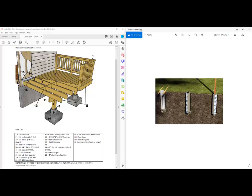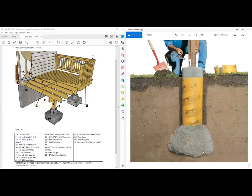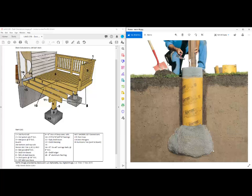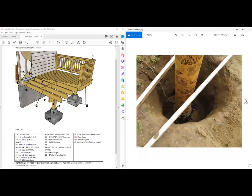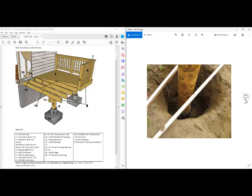Task number six is pouring of the footing. In this particular case, there's no real footing - they just put in gravel because there wasn't that much load and the soil could sustain it. They've just put the sonotube on top, leveled it, and made sure it's vertical by putting in temporary supports, pouring it, and then just putting in a saddle to support the post. This is showing the sequence. We can also provide some sort of bell footing, which is just a wider bottom or base. That's done when you're using the auger and you get near the bottom, you're rocking the auger in a rotational sort of formwork. That will dig out a bell-shaped base to give a larger area along the bottom of the sonotubes. You can also buy formwork that is already in that shape.